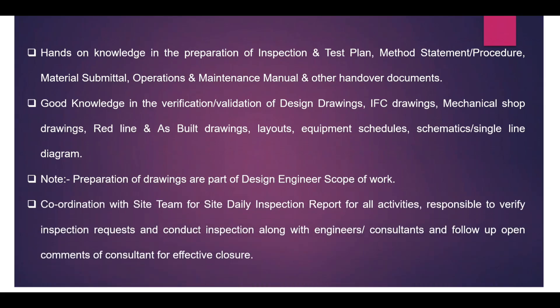Coordination with the site team for the site daily inspection report is essential for all activities. Whenever an activity is finished — for example, installing a particular item — the site engineer informs you to raise the inspection request. You must first verify internally whether the work meets all requirements, then raise the external request to the consultant or client. You are responsible for verifying the inspection request, conducting inspection along with engineers and consultants, and following up on consultant comments for effective closeout.